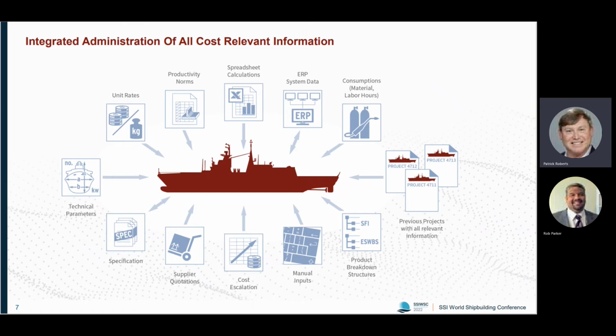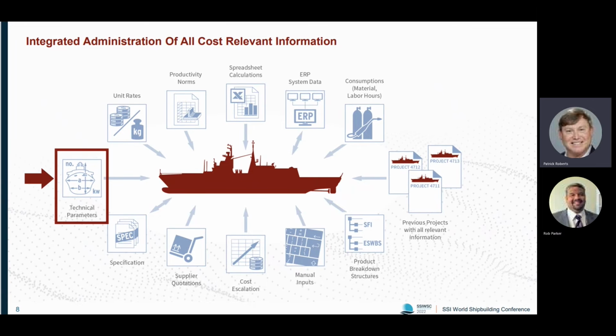We can work with cost escalation and all these different things. When working on a project, we can always very easily access existing historical projects in CostFact. And the one thing I selected for today, on the left side, is the utilization of technical parameters. Technical parameters might be main dimensions when we only have rough information, or on the other side, if we have really detailed information, perhaps already the 3D design model available in ShipConstructor, to make use of this information to support our estimate.